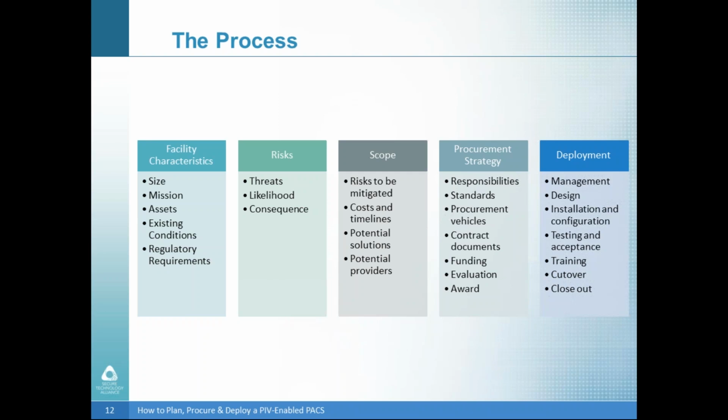You also have a plan for installation and configuration. In most cases, if not all the cases, you'll be actually replacing an existing system. That's just not going to happen overnight. You'll have certain transition periods and phases, not only for the equipment itself, but for some of the existing data. How do you bind some of the existing data to new credential information that you're getting, things along those lines. And your deployment plan also has to address how you're going to test and accept this system. That should be carried over from your procurement documents.